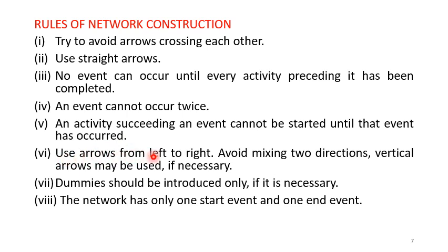Now use arrows from left to right. Avoid mixing two directions. Vertical arrows may be used if necessary. Sometimes you may feel a shortage of space, so you can use vertical directions, but limit its use. Try to avoid that vertical. Always use arrows from left to right. Make use of the space. Plan your network, taking into consideration the space available for you to draw. Draw the network diagram neatly.